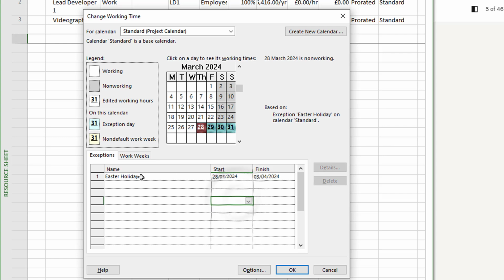So this basically allows you to quickly add any holidays without needing to remember what days are on holiday and what days people are working. This also gives you errors if you input work on those days, meaning that it is very obvious that you can work around that.